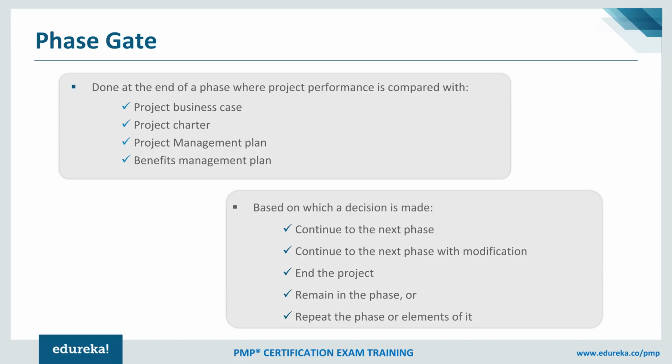We'll of course take an example. But for now, let's take a quick example of the project charter or project management plan. You may have put up there, as a part of the project management plan, that you would be completing your requirements gathering, with a start date and an end date, and what you will get as an output is a requirement specification document. So this is what you have agreed as a part of your project management plan under scope management activities.